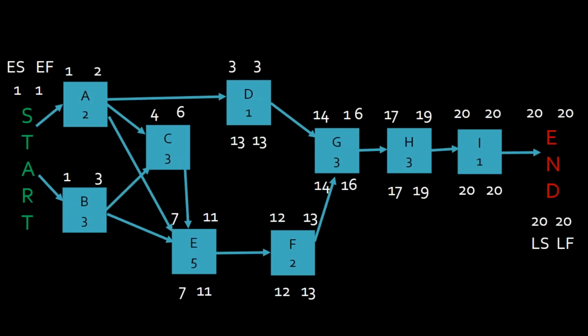Before I move further backwards in this backwards pass, do you see why the late finish of D is 13? Do both of you see what I did there for D? It's because, again, the biggest thing is the dependency. D, looking forward, has G to worry about.